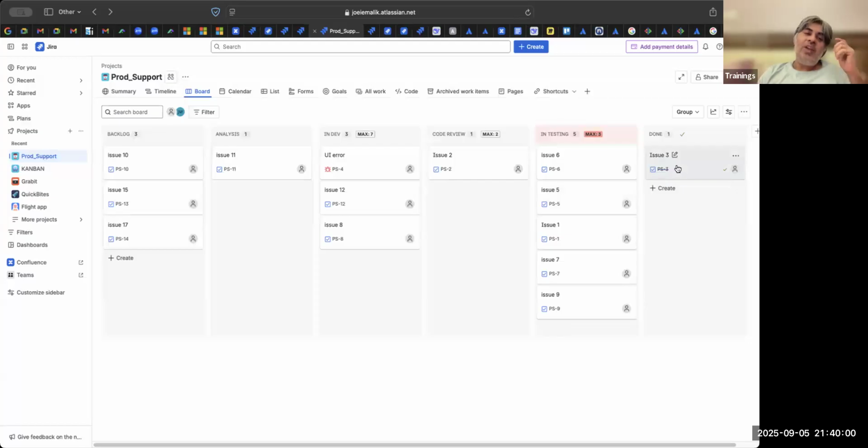Our capacity is that we have promised the client that, boss, every Saturday morning, minimum, we have 3 developers and 1 QA. We should be able to give you at least 5 tickets every Saturday. Every 1 week, we will be able to deliver you minimum 5 tickets because we have that bandwidth. A QA can easily test 5 tickets, isn't it? So Sudipta can easily test 1 issue every day. What is the big deal? And these testers can easily fix, even if it is a complex issue, they can easily take 2 days, even if they take. So easily they will be able to fix 4 or 5 items, 6 items.